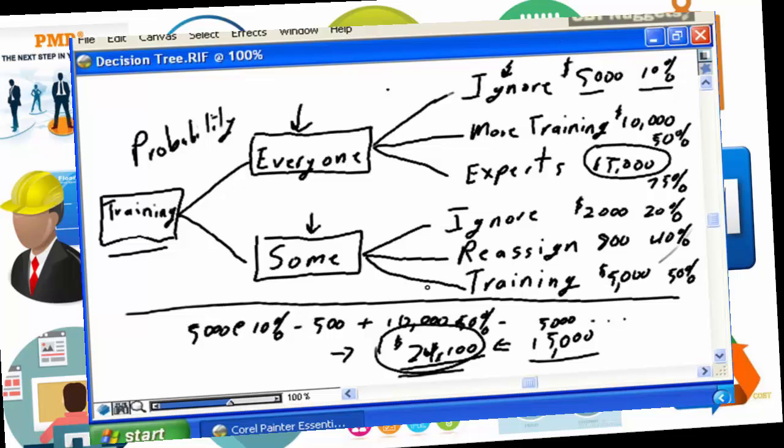What's the likelihood that you may have to take experts and additional training for some of the team members? You need to take individual risks, individual assessment of the probability of risks, individual assessment of the impact of risks, and determine what is the right number. Is there decision tree analysis? Evaluating each and every possibility, is that the right number? Is the highest possible number the right number? There is no right answer.